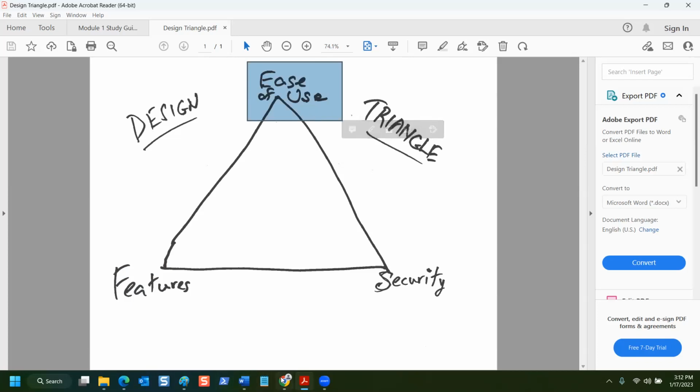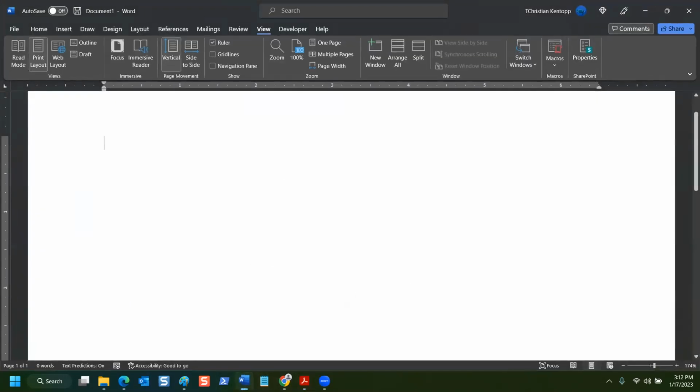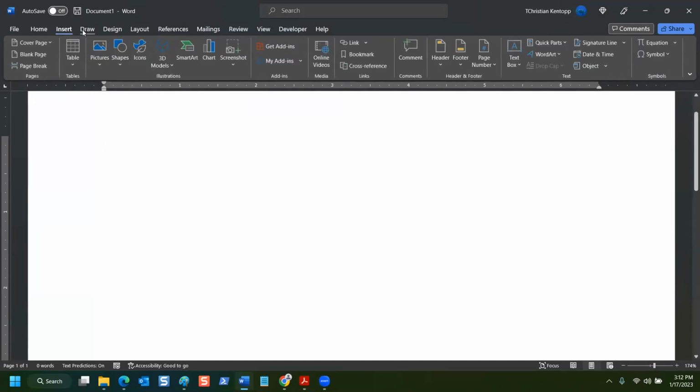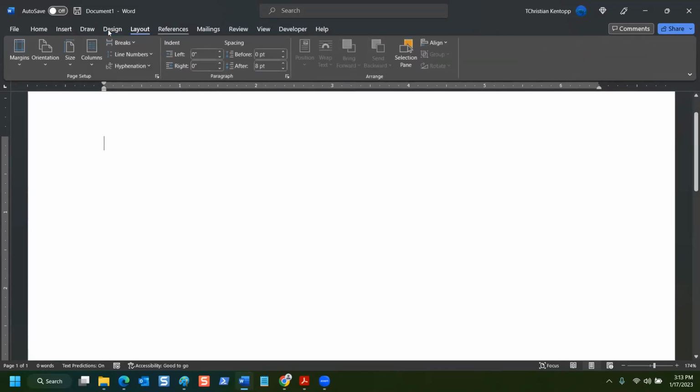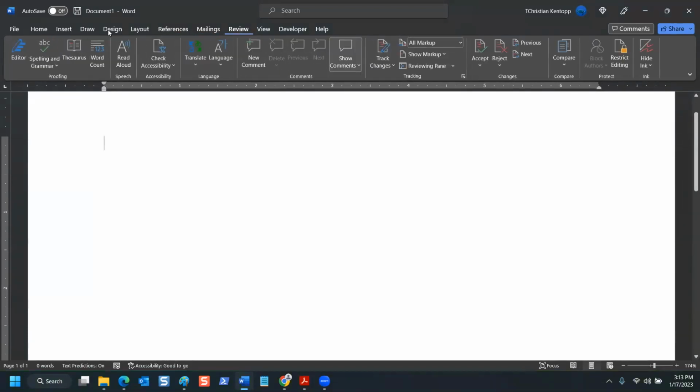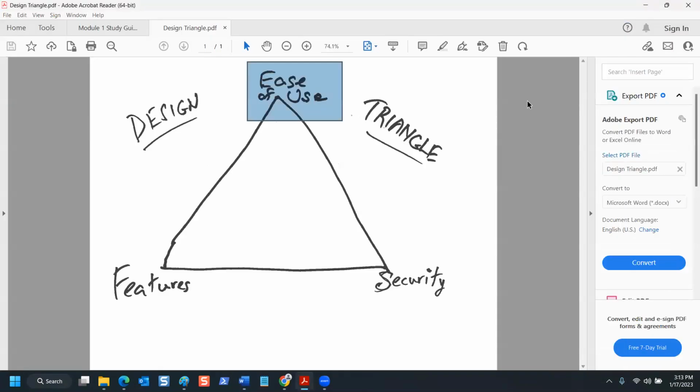Because they're like, I need a pilot's license to operate your software. I just can't use this. It's a nice solution, but oh, can we put our old solution back? That happens. It's not a pretty thing. What do you do? You identify the 20% of the features and resources that you know will be used 80% of the time, and you incorporate that in this concept of how to apply weight to your given scenario.